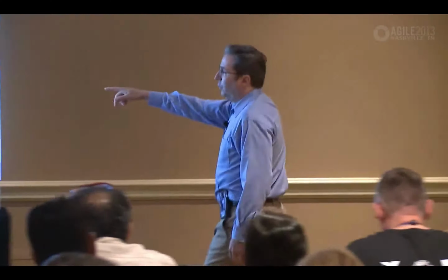Lifecycle profit being the total profit potential of the product over its lifetime. And accounting might define that to be a fixed number of years, 5 years, 10 years, but you run the math. Versus the extra cost of maybe hiring more artists and putting them on to individual teams so that we didn't experience the 6 weeks. You could start comparing the two and say which was the more economically sensible choice.